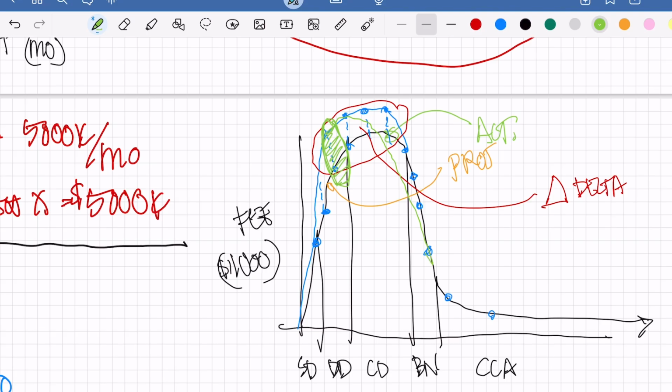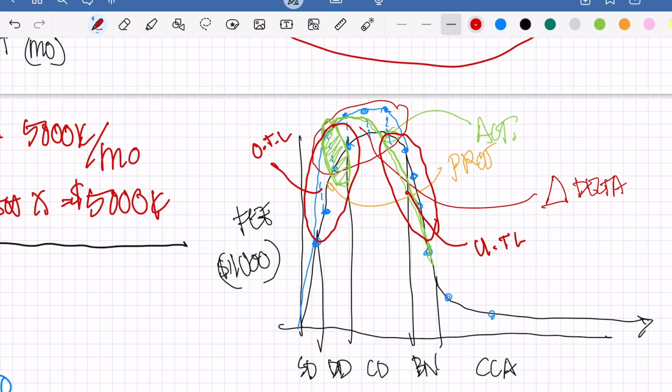Now, here's the deal. In this particular example where I'm putting it back on track, notice that I'm not going back to the black line. I have to make up the fee that we busted all here. So the only way to do it is to make up the fee that we busted all there, right? So we're over the line over here, and then over here, we have to be under the line to make up that difference. There's a delta.